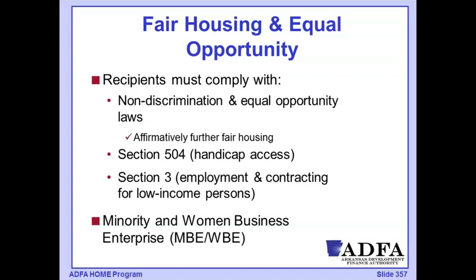So there would be Section 3 language within the contracts that are associated with the project that would require the prime contractor, and he would be passing on the responsibility to the subs to make sure that when there were employment or contracting opportunities, this standard outreach is done so that Section 3 qualifying persons or businesses would know about those opportunities, and to be able to track and report that back to ADFA.